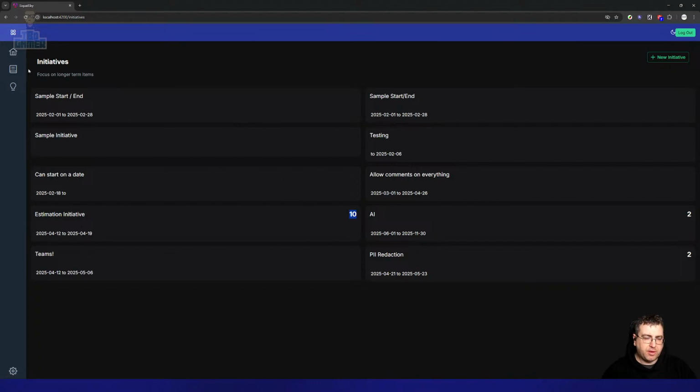So ultimately what I want to do is keep track of how long that estimate took to complete. And then based upon the estimates you put on stories in the future, be able to warn the product team, by the way, based upon historic results, there's a risk of this missing its expected completion date, right?